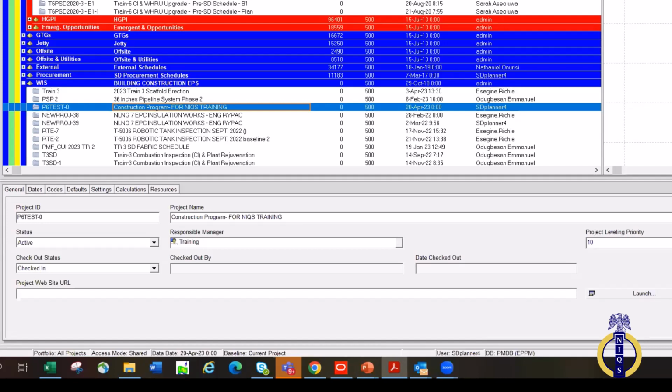For me, the method I'm showing you is for beginners. Ordinarily, I don't go through all of that. I don't fix my end date. That must finish, but I don't do that. It's like you're constraining your schedule and it's not right. It's not good to constrain your schedule. But for the purpose of training, and for beginners, it's good to have a pattern to it so that you don't lose the students. So that's why I'm going through all the steps the way I'm doing.